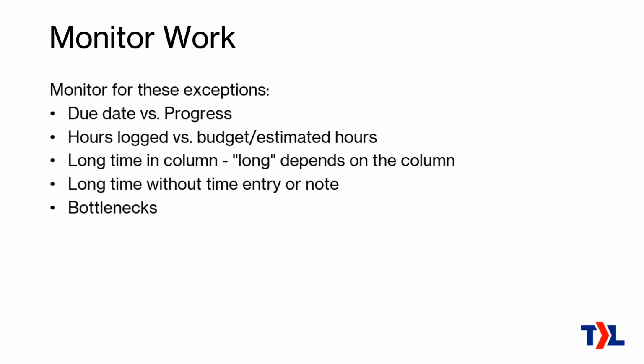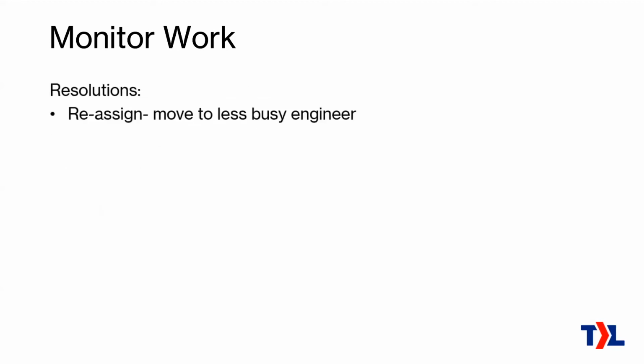And so they just build up a big queue of work that doesn't exist for the other engineers, and then they slow everything down. So you want to be aware of that so you can fix that. Some ways to resolve that, especially for the bottlenecks, are to reassign the work. You can move some work to a less busy engineer.